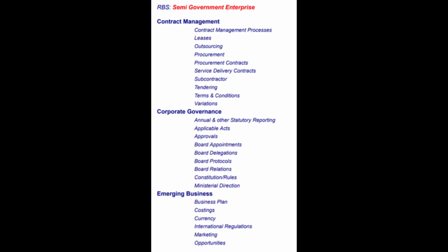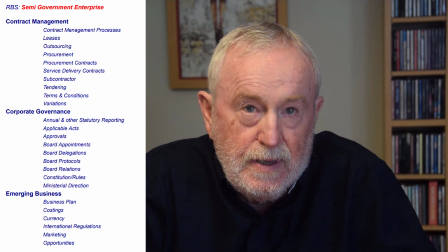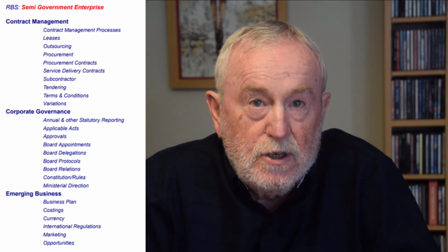There are several items to highlight. Level 1, the bolded lines, generally reflect an organisation's management structure. This enables risks to be cut and diced so that managers can see data anywhere in the organisation that is specific to their role and responsibilities. The Level 2, more detailed items, are subsets of the management areas and help in a workshop to kindle discussion on potential risks. Using an RBS in a workshop is described in stage 1 of this playbook.